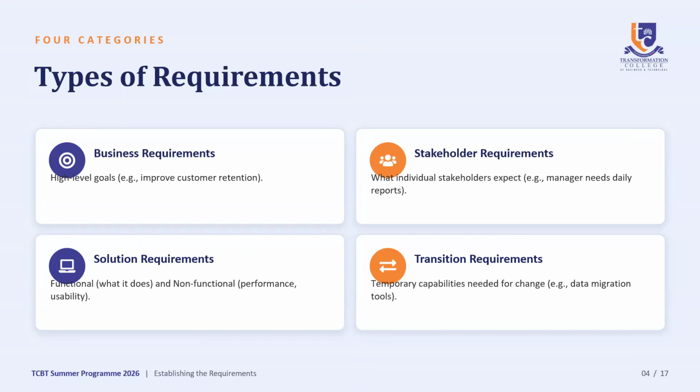If they need new generator sets, right, you have to look at what the backup plans are that would allow the business to function as we are moving them from either an old transformer to a new transformer. Okay, they need a small generator to power the business. If it's a hospital, and we're changing hospital beds for the transition requirements, let's not change all hospital beds at once, right? Let's change them in batches, right? Let's say 20 today, change them. Let's recommend another 20, change them, and phase it in a transitionally neat way to ensure that there's continuity in the business and it doesn't fold up, right?